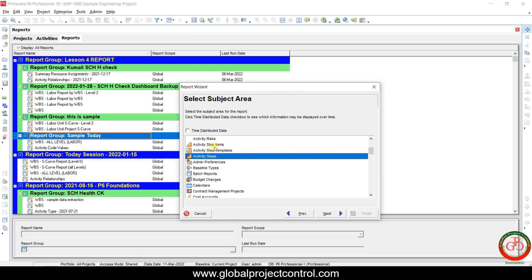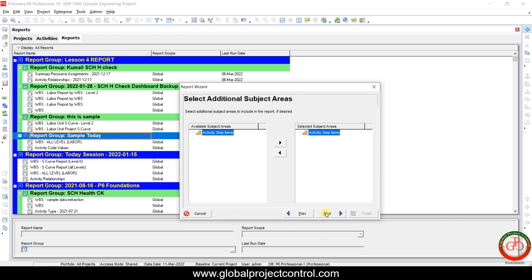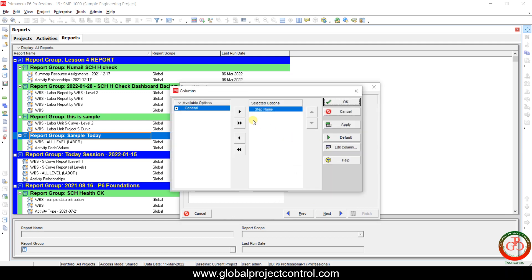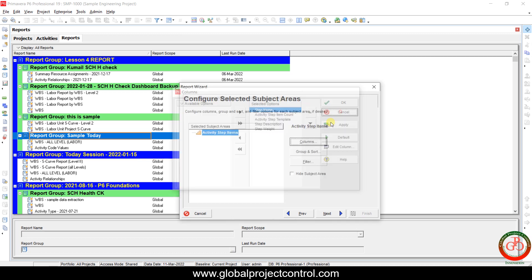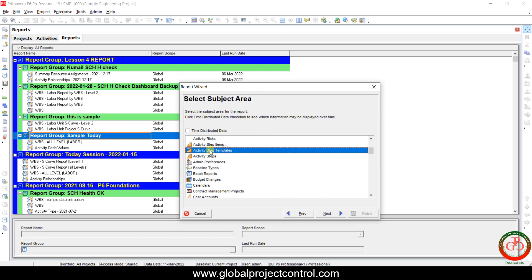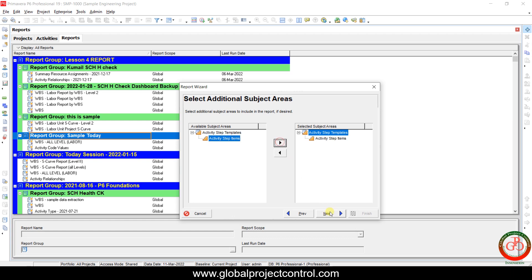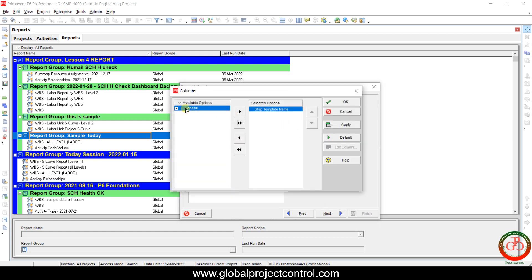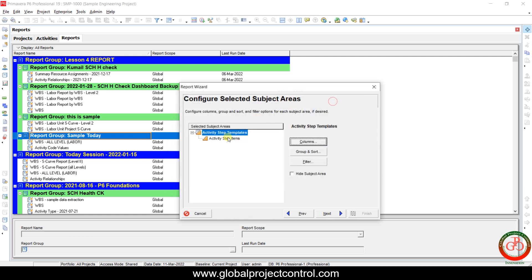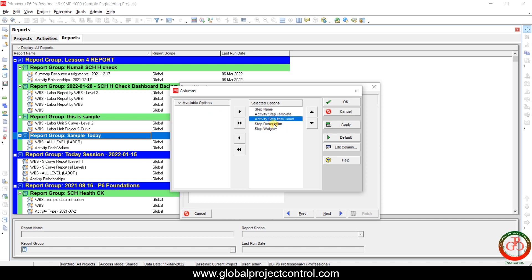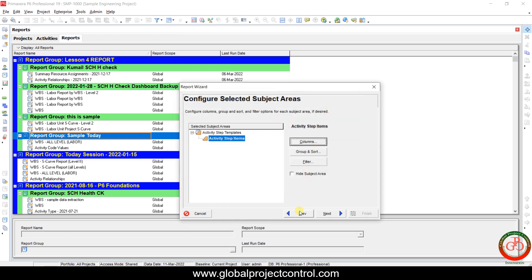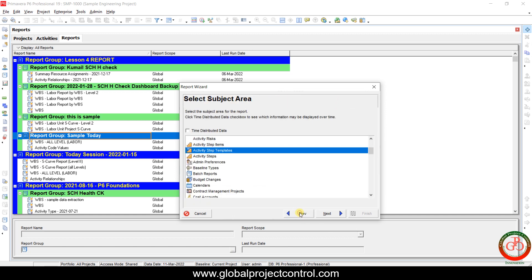Scrolling down, you can find three types of step reports. The first is Activity Steps Items — this kind of report focuses on the step details internally, but you cannot find which project the step is connected to. The second is Activity Steps Templates — by these report templates you can find which step template you created and which items it is connected to. It focuses on step name, template description, and step weight, but it is not connected to activities and projects.